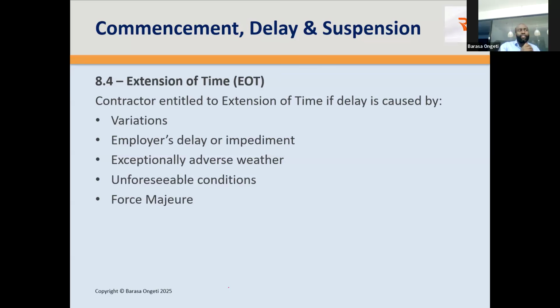is meant perhaps to relocate squatters who are by the side of the road, or roadside vendors perhaps, or do some land acquisition, which happens a lot, and the employer has not secured the funds to do this, the contractor is entitled to an extension of time. You may have adverse weather, you may have unforeseeable conditions. They're all defined in the contract.